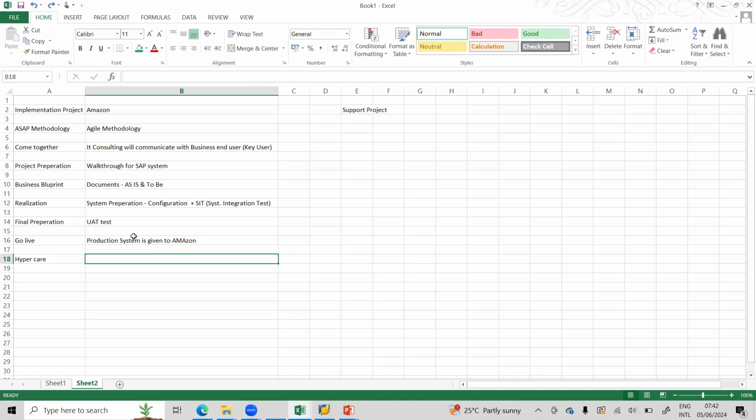Hypercare, after the go live, they will need some help. This happens because they are new to the system. So this goes on, it's a support. If they are not able to create a quotation or sales order or invoices, then we are going to support them. Okay. For at least 3 months. And after that 3 months, we extend the contract for support because this project is done.